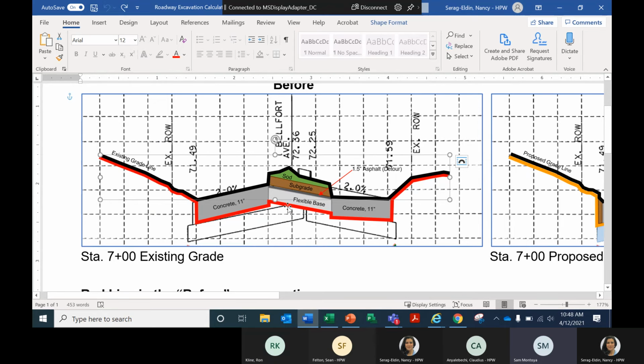Yes, when you install a detour here, so this is a median, right? And here's the asphalt and flexible base that made the detour road, correct? When you install that, part of the specification for its payment talked about how grading whatever's above the detour road is part of the payment for the detour. So any grading necessary, like the removal of the sod and the subgrade and the grass in the medians, ends up being incidental to that pay item. And we overpaid on excavation.